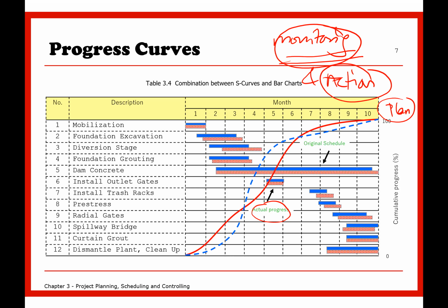And you notice, regardless of the actual progress, at the end of the day, the planning should complete at the targeted or given period. Because the client wants you to complete the project in 12 months, then you have to complete in 12 months, unless the client gives you an extension of time, then it is okay. But the client is always happy if you can complete within the time or even faster. But if you can complete faster, it will put pressure on your workforce, etc.